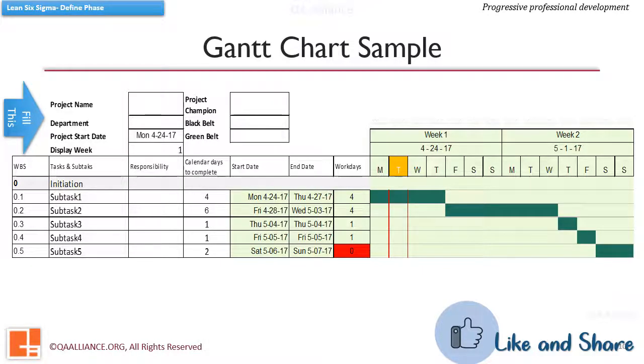Look for the workdays. This template considers 5 days working week. In case the task is appearing to be done on weekend, it'll highlight in red and you can revise the calendar days to make it appropriate. Also, this template has DMAIC-based structuring. Subtask can be added by inserting rows on the identified places, copying formatting as above row, and also dragging the formula from the row above to the inserted row.